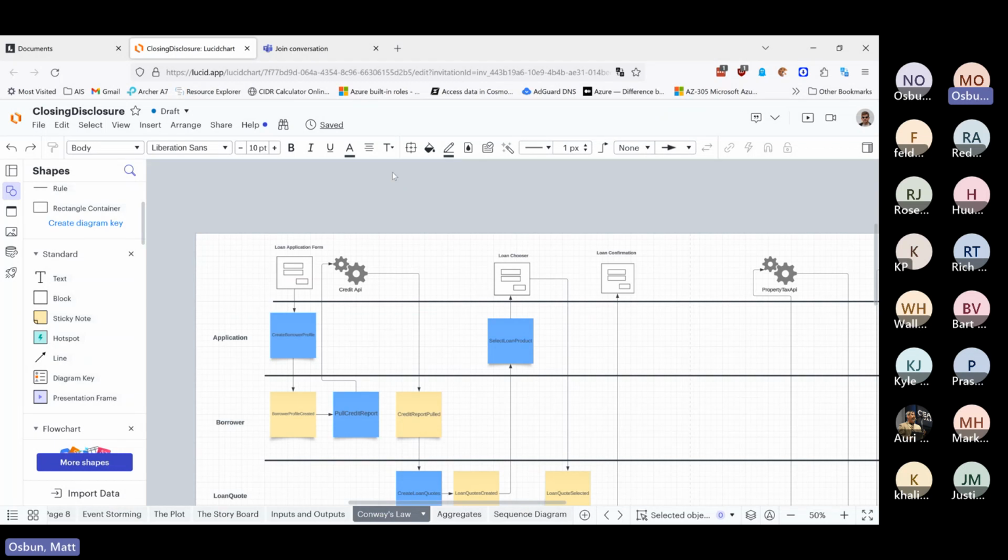When we go and create the requirements for it, we don't do this exactly, but we do intent driven development. So make it very clear what we're building, write code last, not first. I make sure that every stakeholder signs off on what that requirement is.